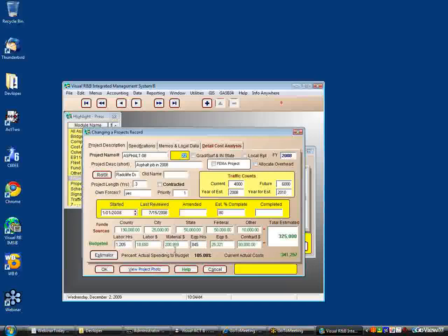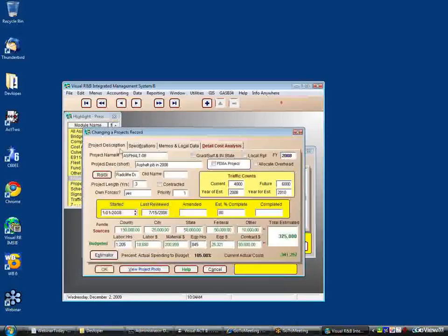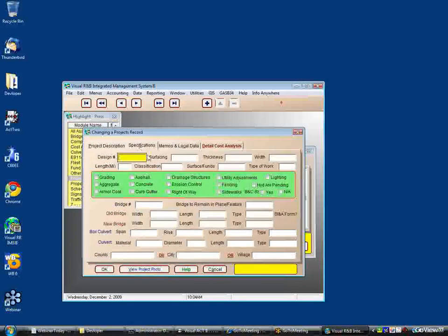And then if you want to budget a little closer, you can estimate the dollars of labor and the labor hours, the material dollars, the equipment runtime hours, and then the equipment dollar cost, and then any contracts you let on your project. In order to keep everything balanced, the material number is a plug number, so that these add up to the 325 that is budgeted.